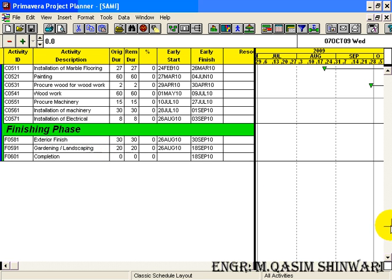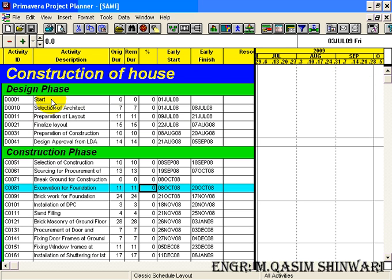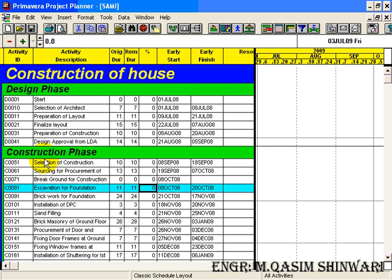Here again you can see that although in design phase it has sorted automatically, but in construction phase again starts from C0051, C0061. It's so because we have entered the activity ID from 51.